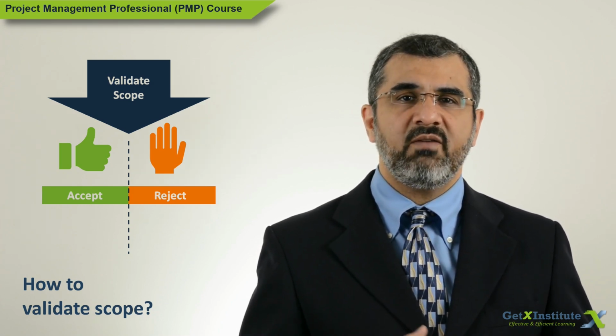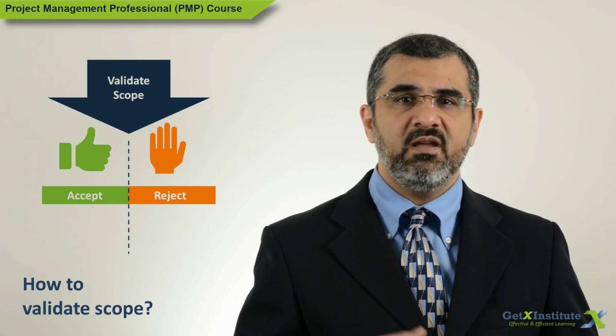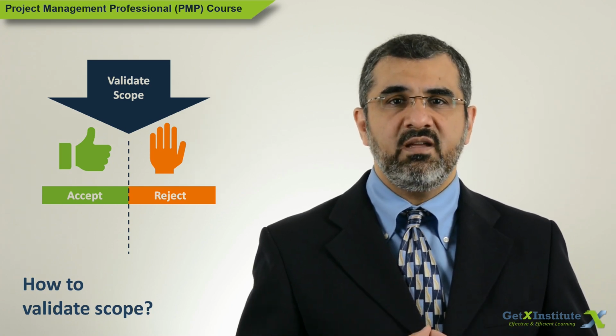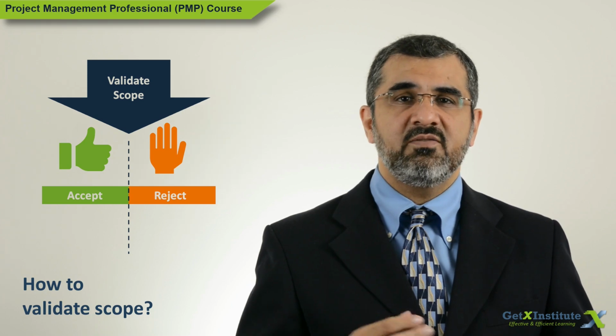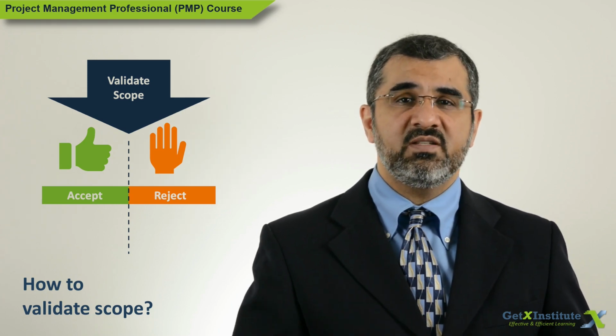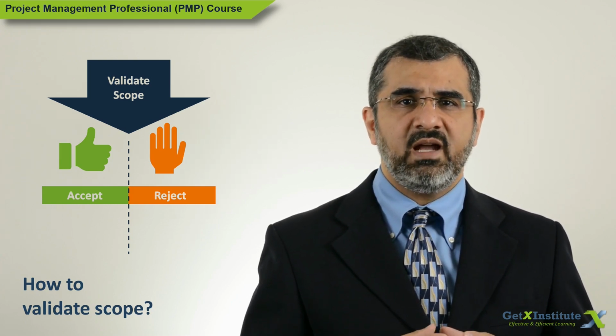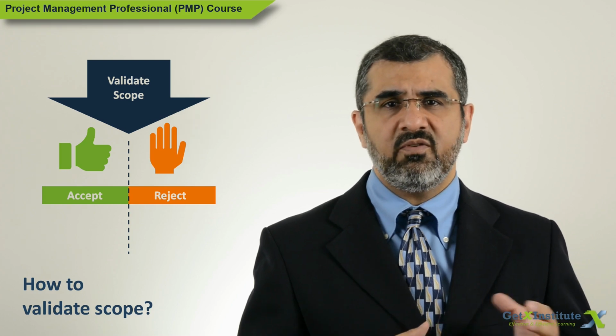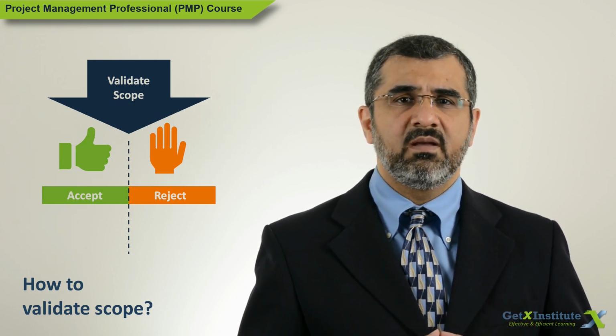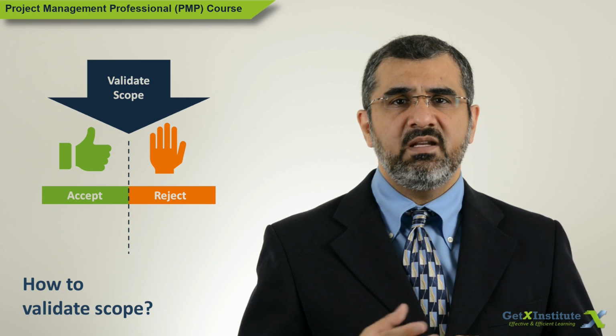So let us look at an example. When we bought our home and when the home was ready, meaning the deliverable was ready, the contractor asked us to come for pre-delivery inspection, which is a walk through the house. We checked the house against the requirements that were given and agreed to before the start of the construction. There were some minor things that needed fixing.